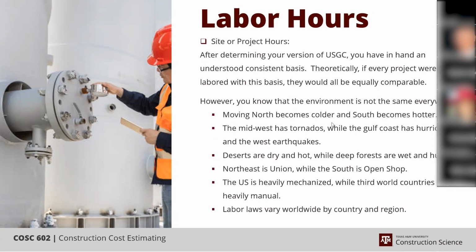Chicago, those areas are highly union, and that includes Ohio and West Virginia. You start moving into Virginia and across the Midwest, it can kind of go either way. They're merit shop based more than anything. And when you get into the South, it's primarily open shop. So that impacts your productivity, and it impacts your wage rates.